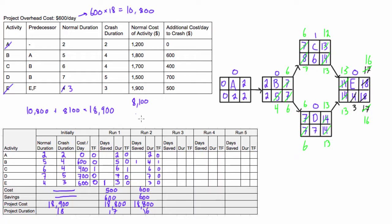All right, so now let's look at this activity B. Our normal duration was five. If you want we can even write that's a four there now just to keep tabs in case you don't like looking at this huge mess of numbers. But we're at a crash duration now. So we're gonna cross off activity B.